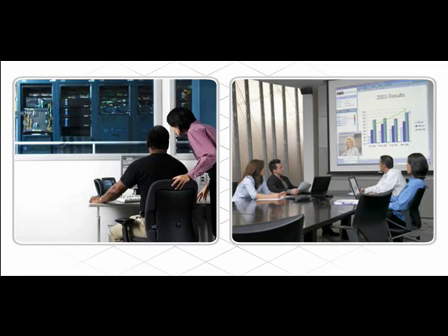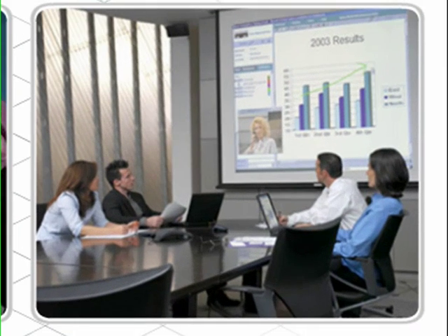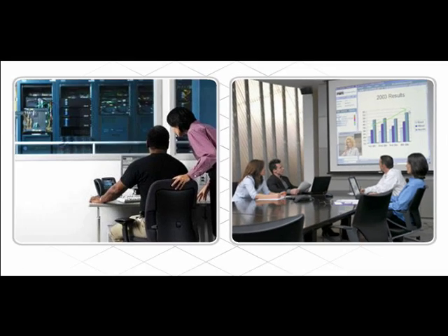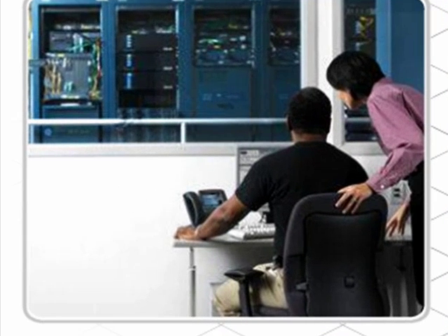It might seem that after the network is up and operational, the team of network engineers is done, but no. After the network is in operation, the design and implementation must be reviewed and evaluated. This evaluation ensures that future projects will benefit from the lessons learned on this project. Finally, if the ISP is also managing the network, the team must monitor the operation and record changes. Remember, it's important that the system is always fully documented and accountable.